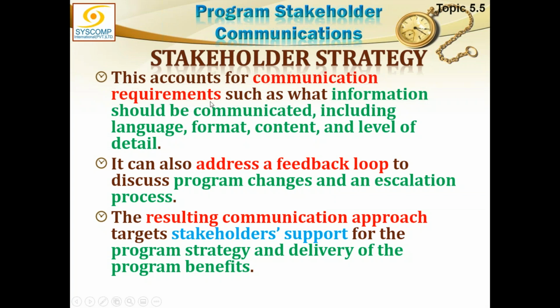Stakeholder strategy accounts for communication requirements such as what information should be communicated, including language, format, context, level of details, etc. It can also address a feedback loop to discuss program changes and an escalation process.